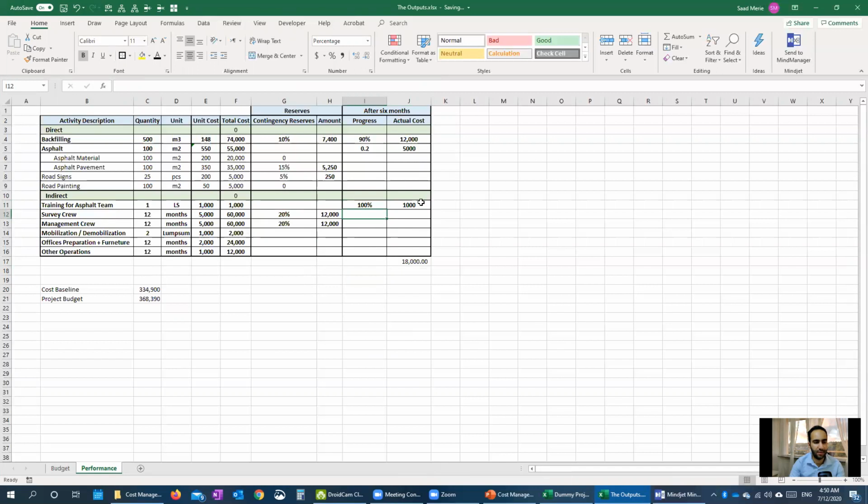The survey crew, we spent 6 months at 5,000 per month. The management crew was 6 multiplied by 5,000. Mobilization was done, so I spent 1,000.